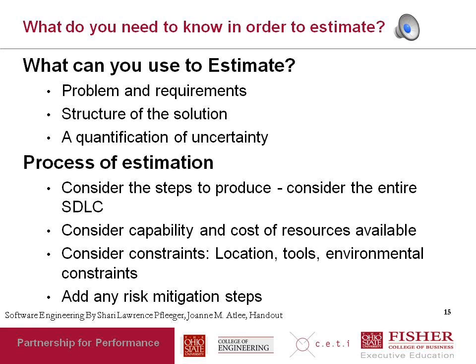If it is a complex software system, you would add more time to your estimate. Similarly, if you could see the list of use cases, you could go use case by use case and get a sense of what implementing each use case might take, and you can add them all up and use that for your estimation. So in those two cases, we used a definition of the problem and the requirements of the system to do your estimation.